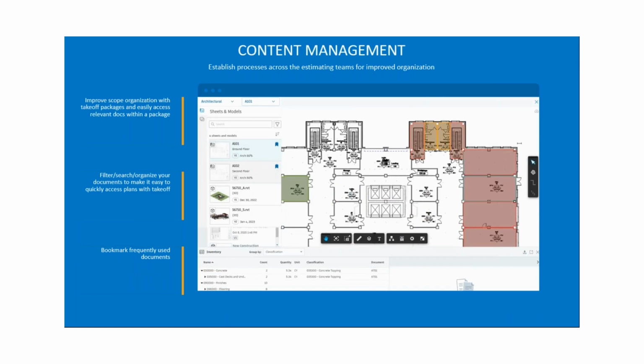Packages are used to organize the takeoffs. Packages are very flexible in how they are organized, from something as simple as by a user, a specific scope of work, or trade. When multiple estimators collaborate on a project, they can use takeoff packages to organize their work based on their areas of expertise and easily share their work with other team members on the same project.